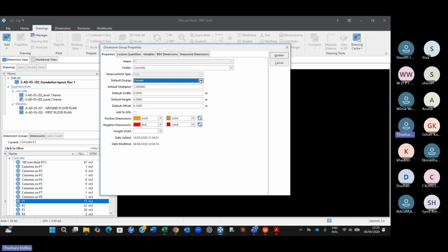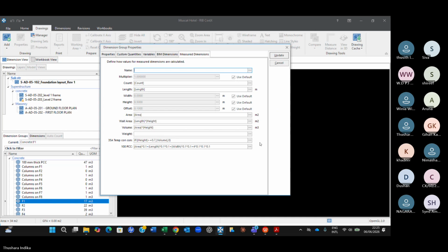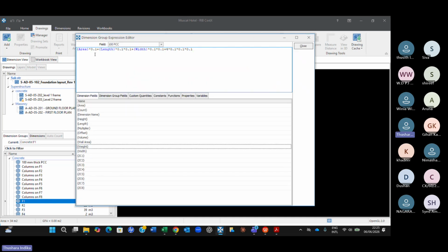And then we want the display, and there also you get length. If it is a linear meter, length is length, of course. If it is a square shaped object, the length is a perimeter. Therefore, when you introduce this, it is wrong; width doesn't come into the picture, and it's only 4 corners.